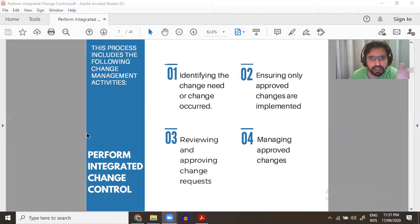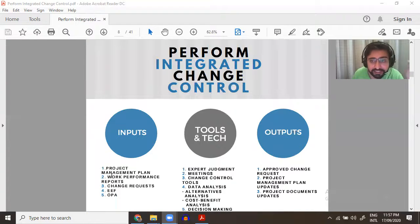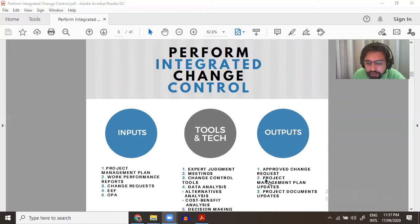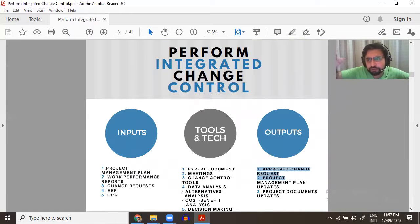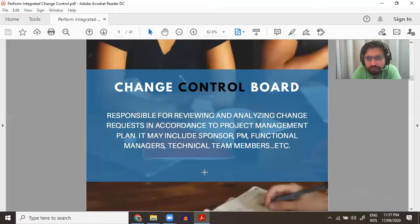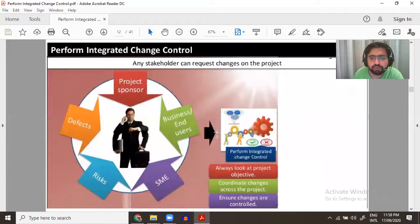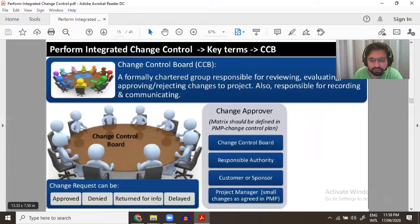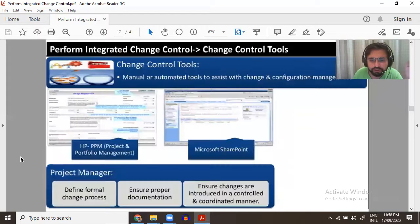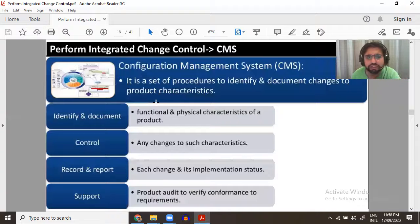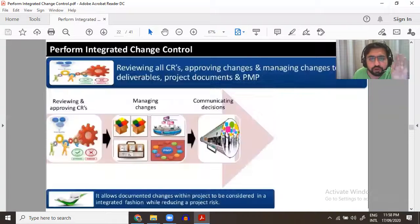The ITTOs include plans, work performance reports, change requests, EEFs, and OPAs as inputs. Approved change requests are the key output. Tools include expert judgment, change control tools, alternate analysis, and cost-benefit analysis — basically checking whether we should move ahead. The Change Control Board can be a steering committee composed of expert judgments and subject matter experts; even the project manager can be part of it. Combining the change control board, change control system, and tools with the configuration management system gives you the Project Management Information System, which is important for your exam.